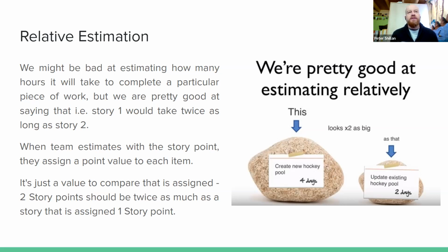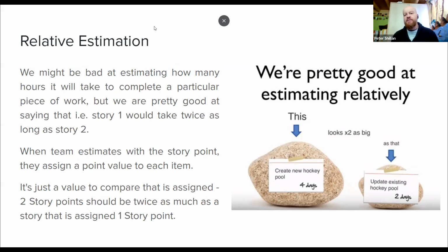And then we can think, okay, so if it takes me 1 point to do this relatively small thing, and then we're talking about this other task that we have to do, how many times more effort? So it's more like relative effort rather than relative time. So again, it could be time complexity, the fact that maybe we need to do some extra digging into something, etc. So we can talk about that and then come up with these relative estimations,